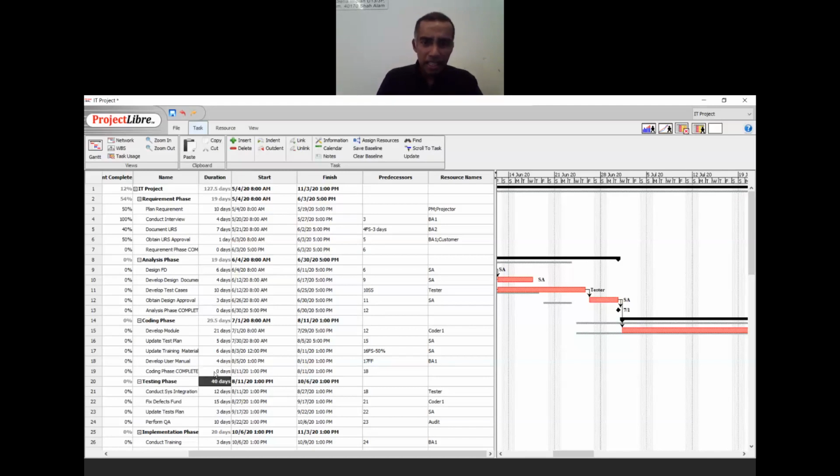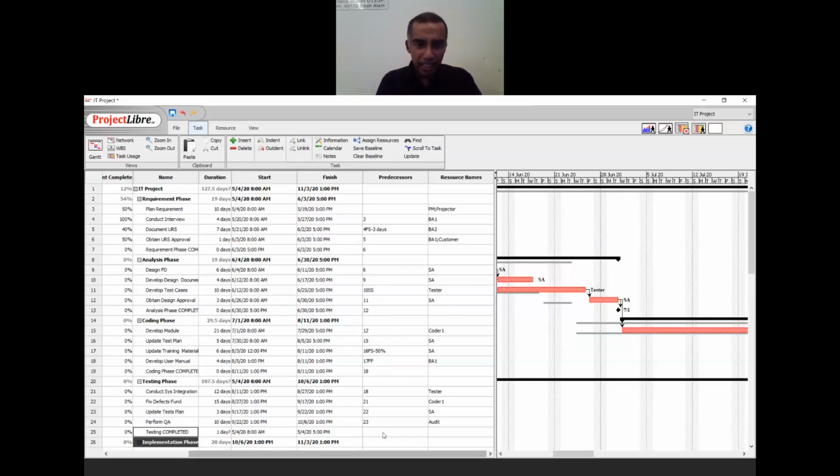And duration, make it 0 days. And next one, under testing phase, you insert, and you can say testing completed or testing phase completed. Link them up, the predecessor to the previous one, 24, and 0 days duration.